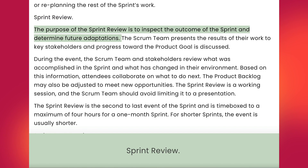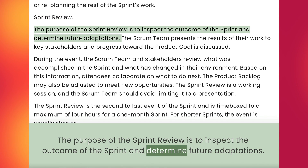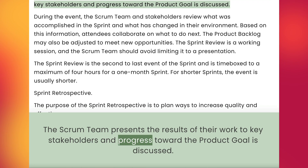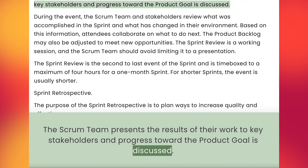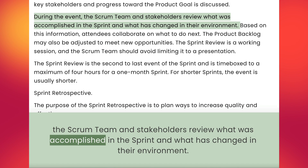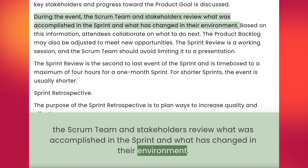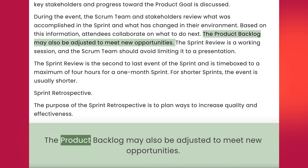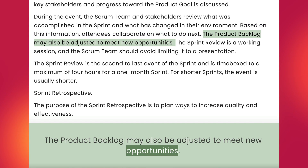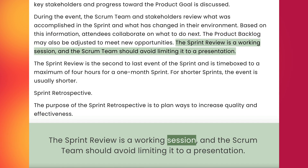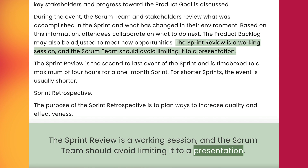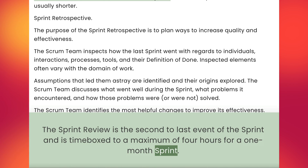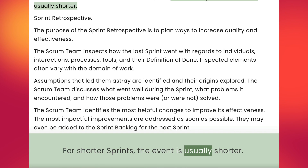Sprint Review. The purpose of the sprint review is to inspect the outcome of the sprint and determine future adaptations. The Scrum team presents the results of their work to key stakeholders and progress toward the product goal is discussed. During the event, the Scrum team and stakeholders review what was accomplished in the sprint and what has changed in their environment. Based on this information, attendees collaborate on what to do next. The product backlog may also be adjusted to meet new opportunities. The sprint review is a working session and the Scrum team should avoid limiting it to a presentation. It is time-boxed to a maximum of four hours for a one-month sprint. For shorter sprints, the event is usually shorter.